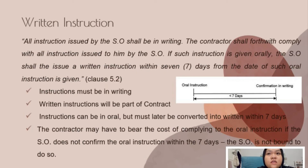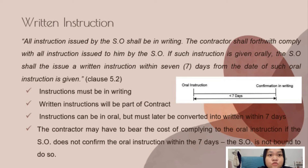Clause 5.2 - Return Instruction. This clause explains that the instruction must be in writing. Return instructions will be part of the contract. Instructions can be oral, but must later be converted into a written return within 7 days. The contractor may have to bear the cost of complying with an oral instruction if the SO does not confirm it in writing within 7 days, as the SO is not bound to do so.